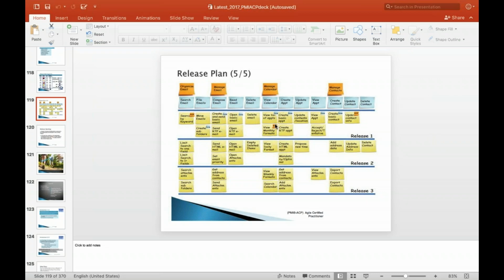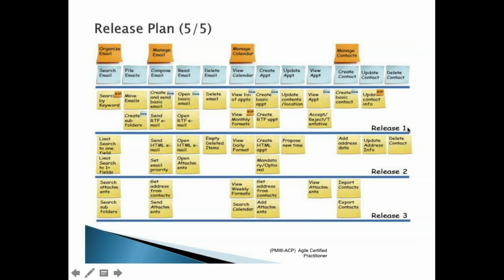No, first they do the release plan. Each release, what is it that you are going to deliver, right? Then based on that, they decide on the number of sprints required. So they take in functional requirement documentation, DRD, these things, and from that they develop the user stories. And based on the prioritization of user stories, they sit with the customer and ask, release 1, which user stories do you want, which are of high priority for you? Release 2, which are the user stories you want? Release 3, which are the user stories you want? And also